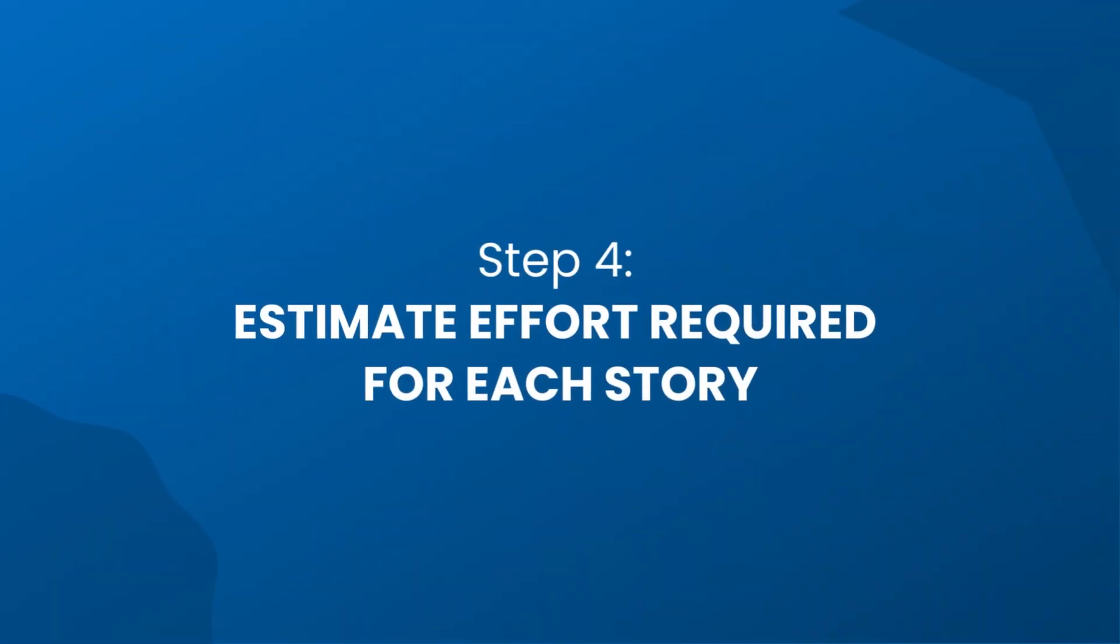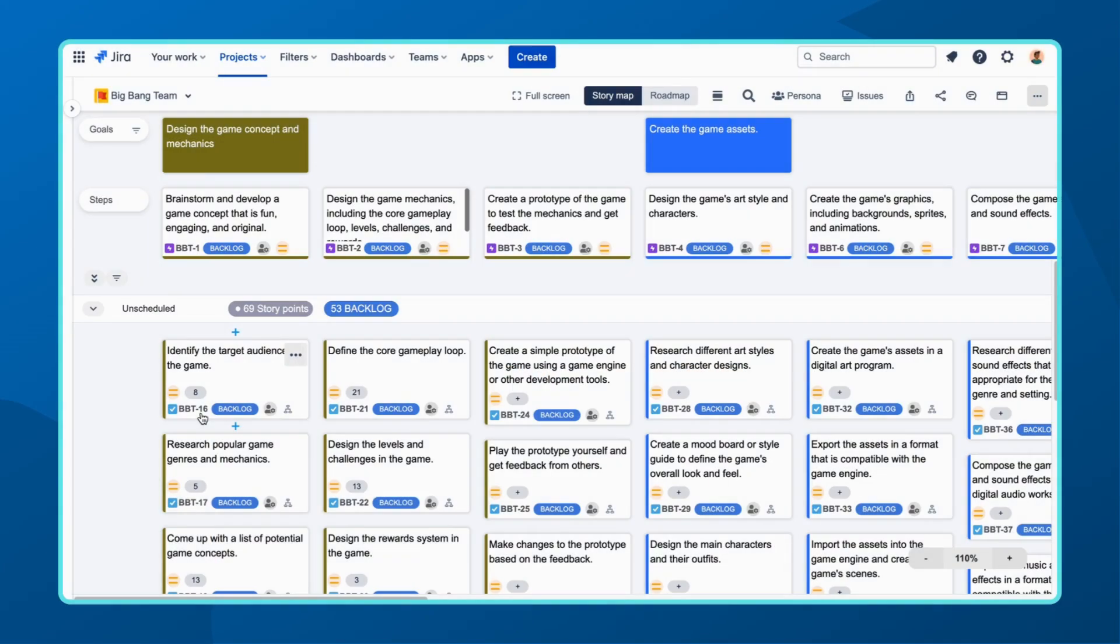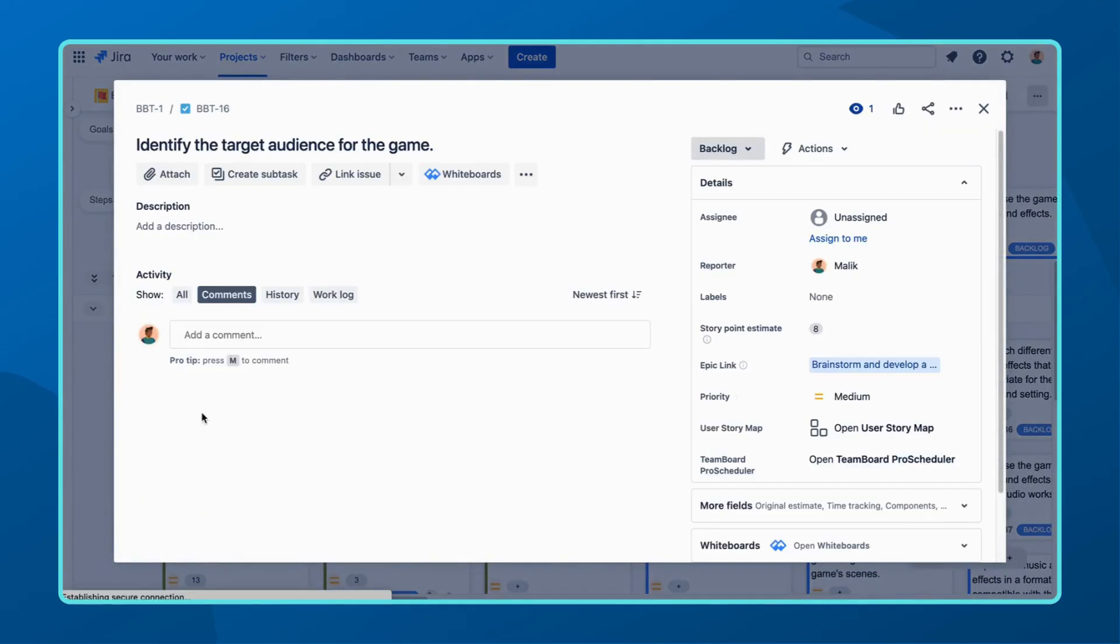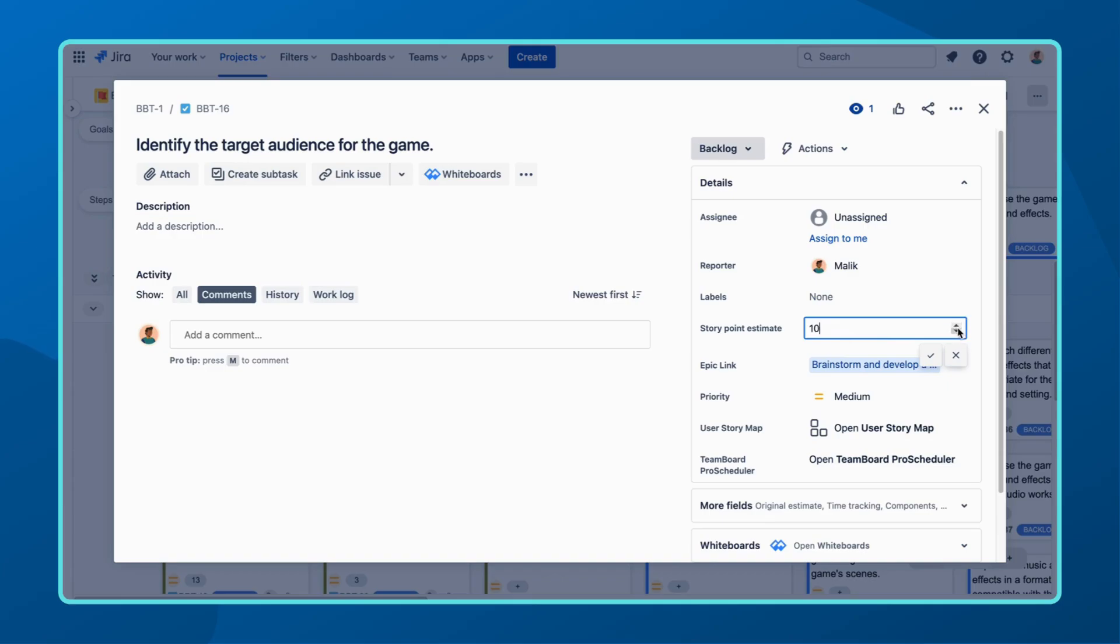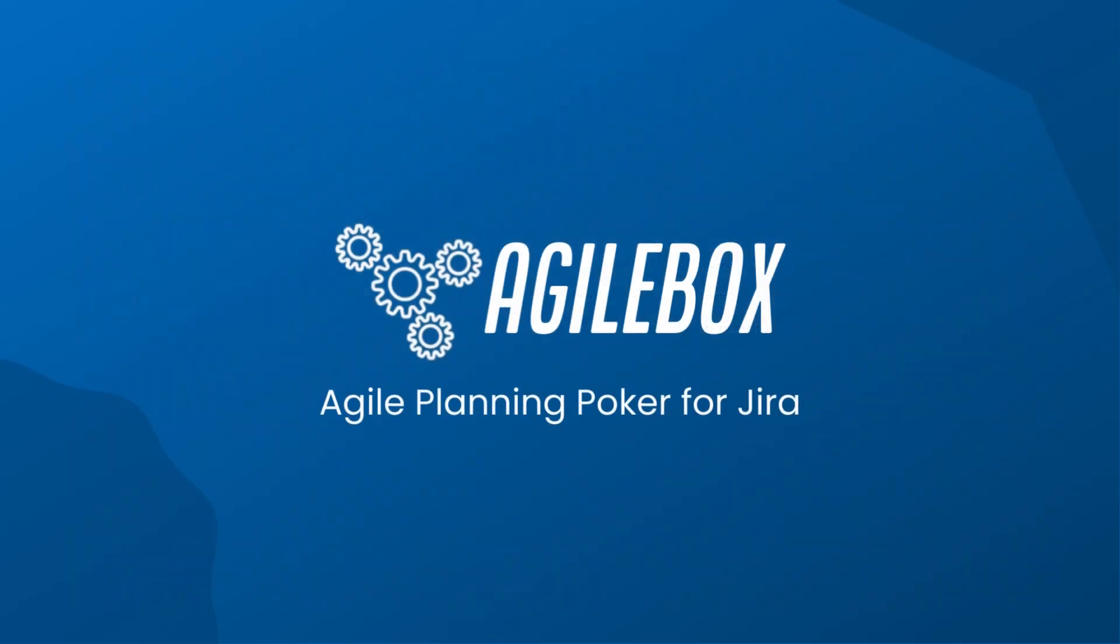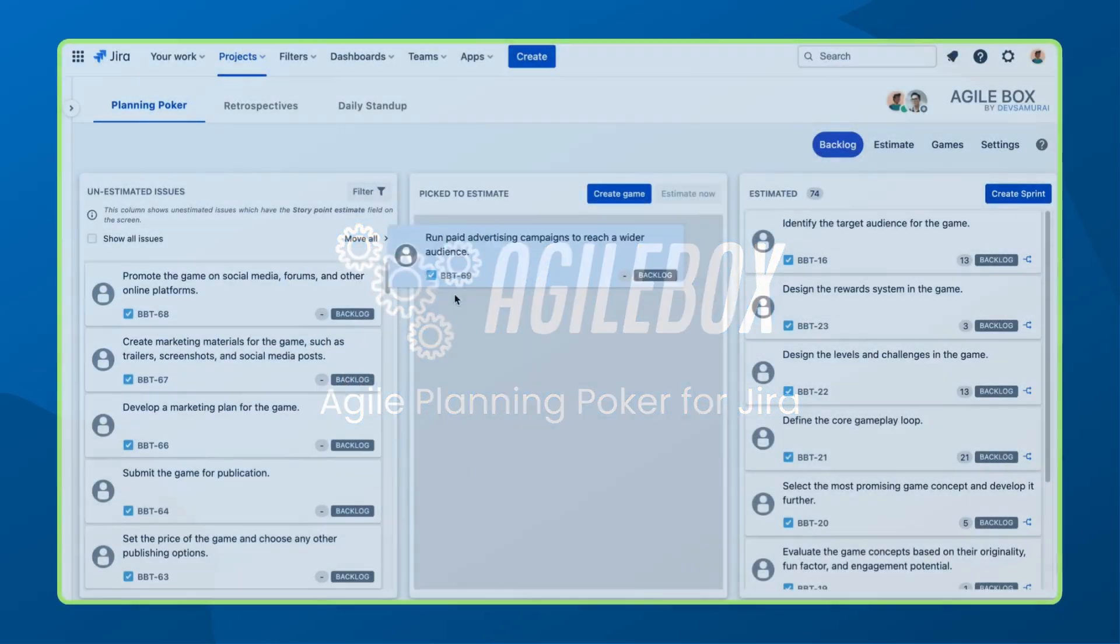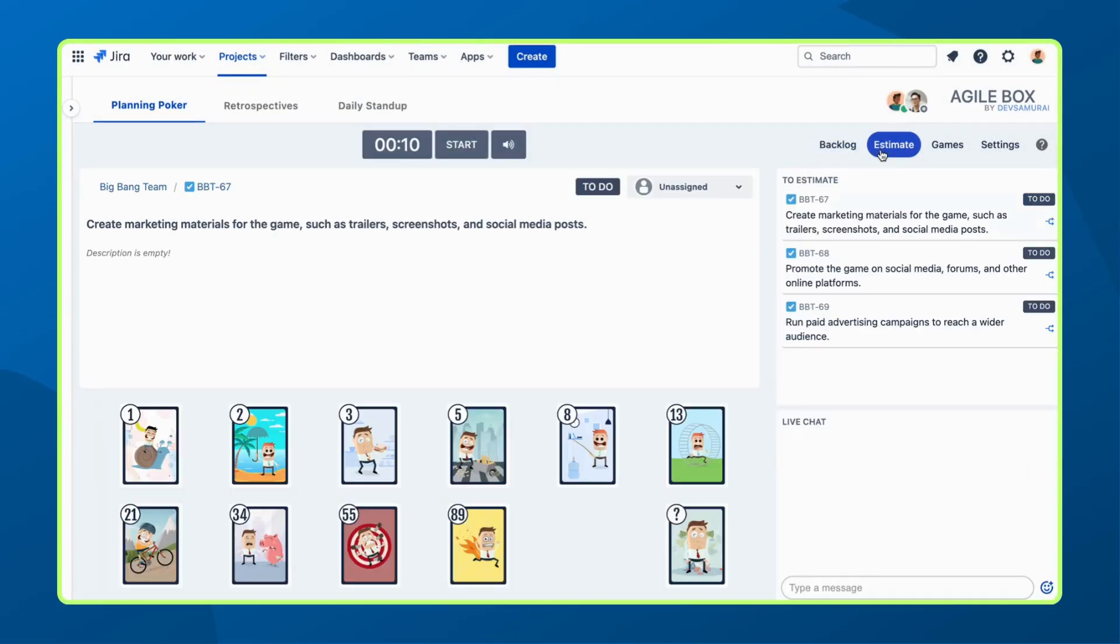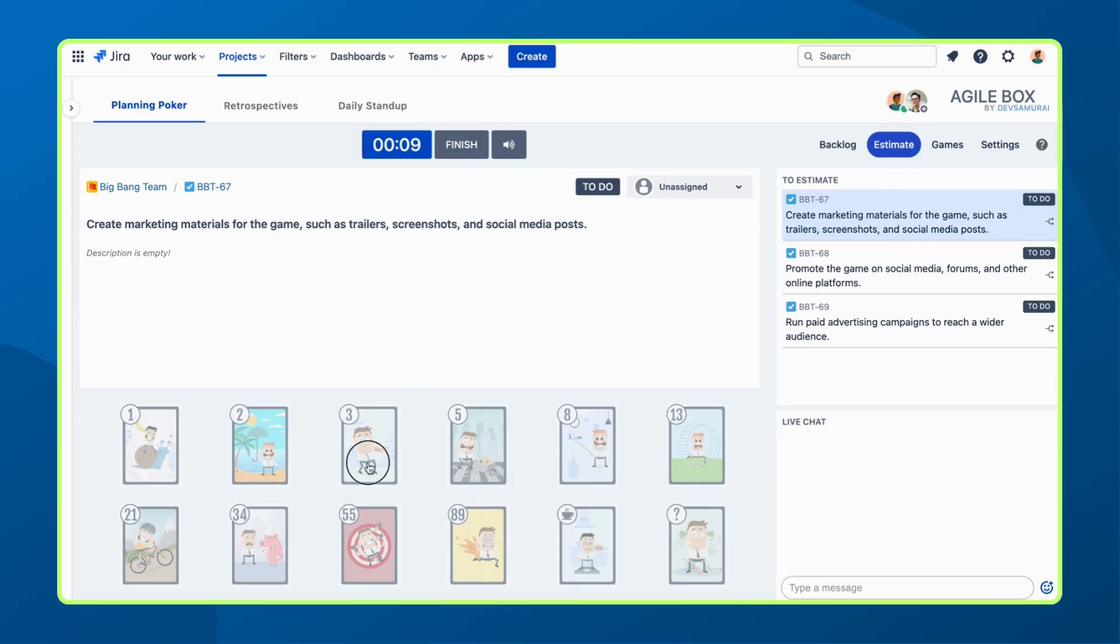Now in step four, we get into estimating the effort required for each user story. Gather your team and have a discussion to finalize the estimated effort needed for each story. This is where story points come into play. Consider using tools like Agile Box's Planning Poker to help with story point estimation.